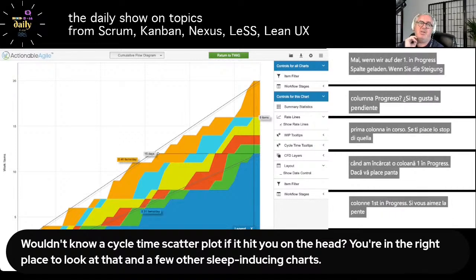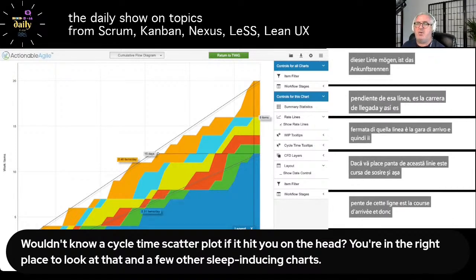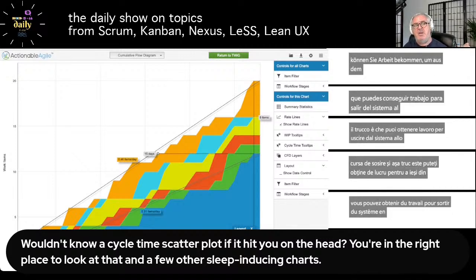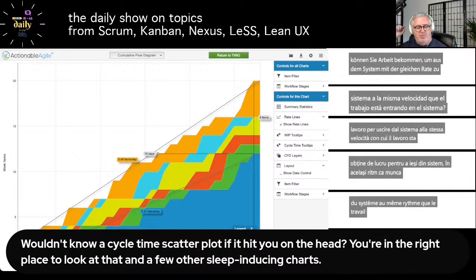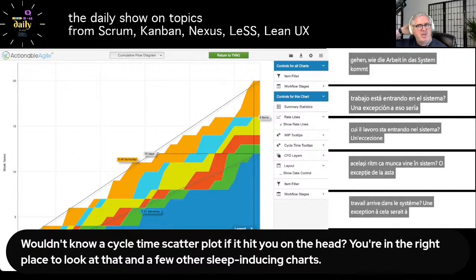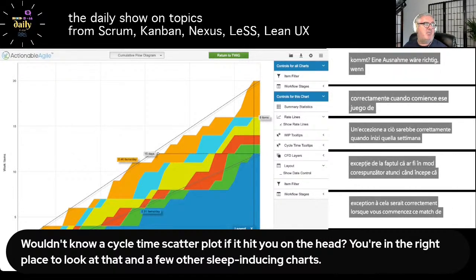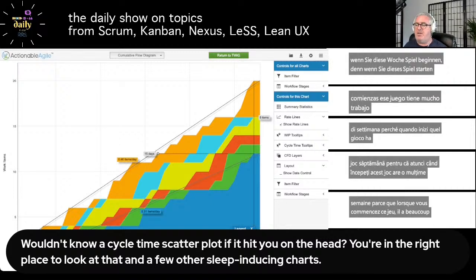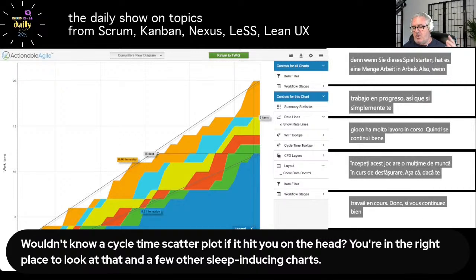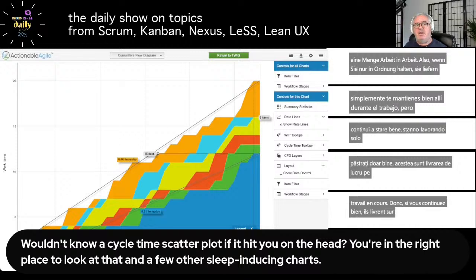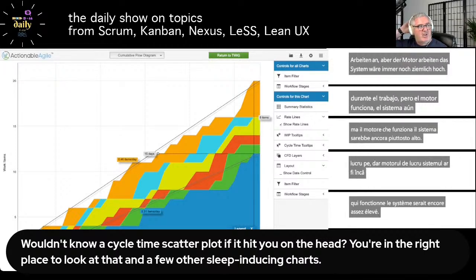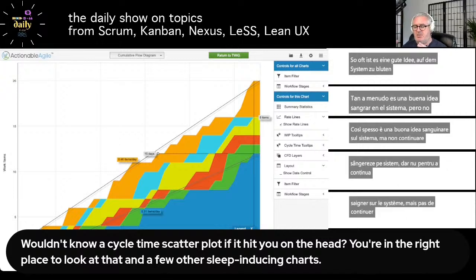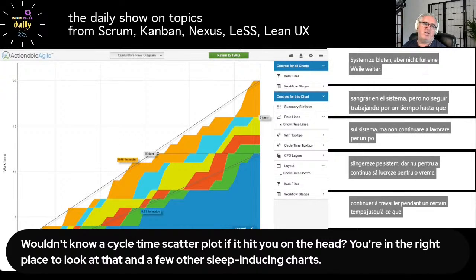And so the trick is, can you get work to go out of the system at the same rate as the work is coming into the system? An exception to that would be probably when you start the Twig game, because when you start the Twig game, it's got a lot of work in progress. So they're delivering work and all that, but the amount of work in the system would still be quite high. So often it's a good idea to bleed down the system, but not take any new work in for a while until the system gets under control, and then you start bringing work in.